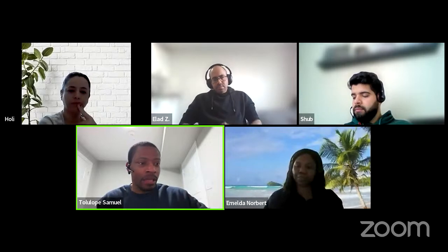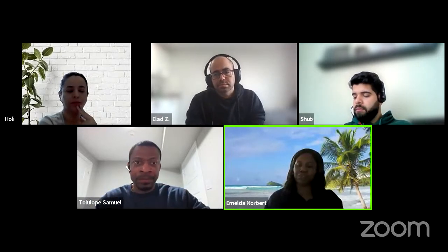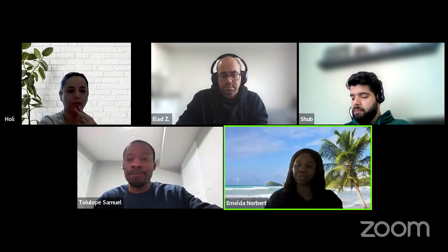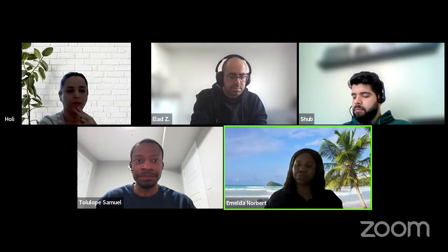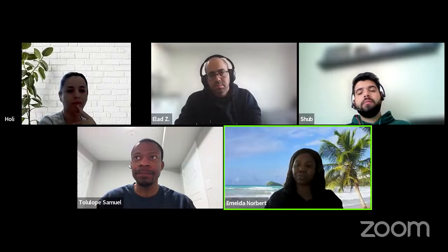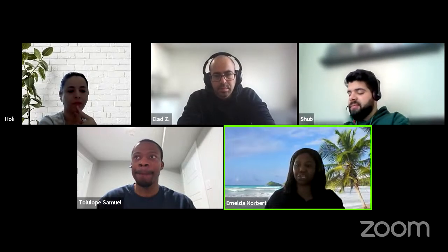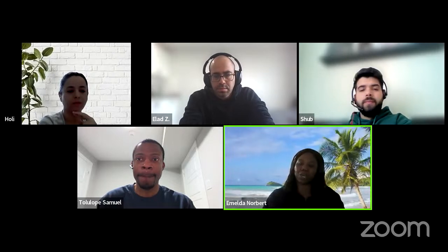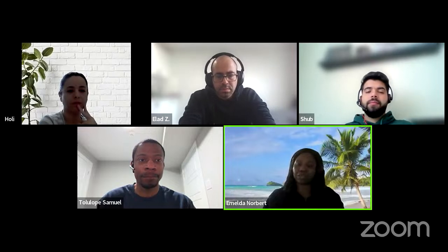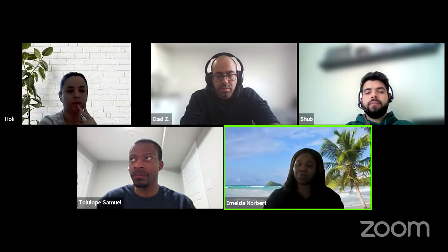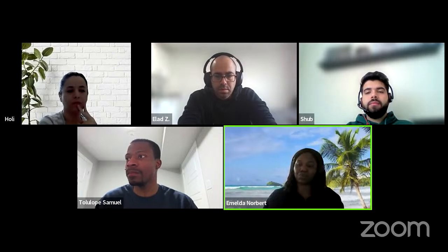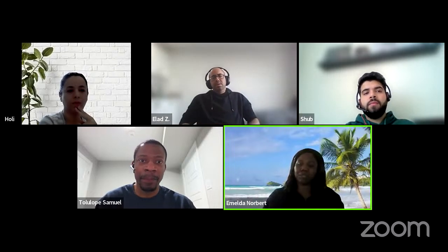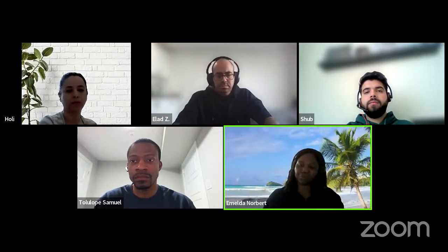Yes. Go ahead, please. Yeah, first of all, because it's already been shared, we already know the topic we are discussing. I would first of all know the people that are involved, people that are responsible. I will use the rating matrix to know the key people that are involved, and also hear their own pain points. I will analyze them and also find out the mode of communication which is more favorable to them. Is it physical or interview, meeting with them? So when I've done that, then I will start engaging them one-on-one.